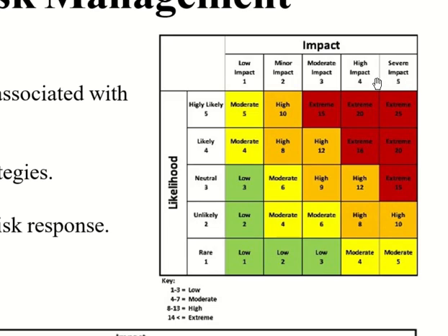But you are only using that material for painting of external walls, that's it. If that risk event happens, your whole project will not be delayed. Only the external paint, which is almost the last activity, will be delayed by a few days. So the impact is very low.